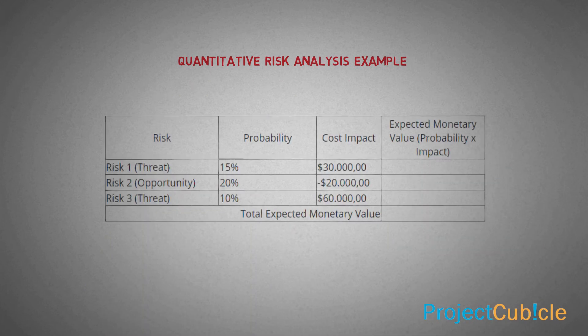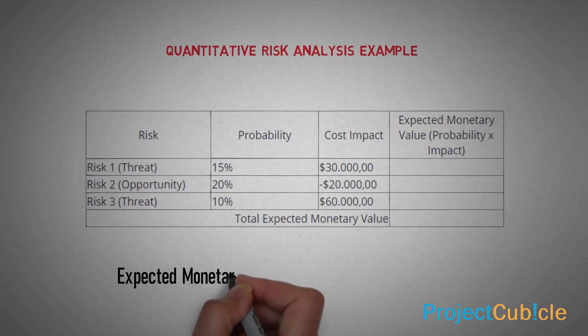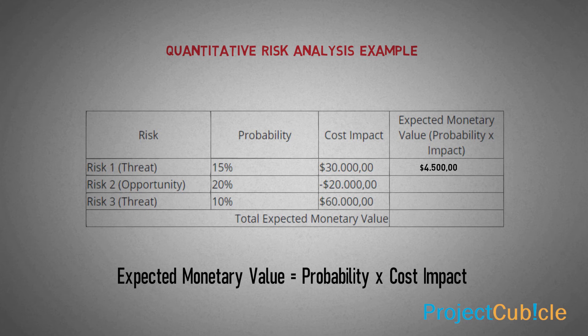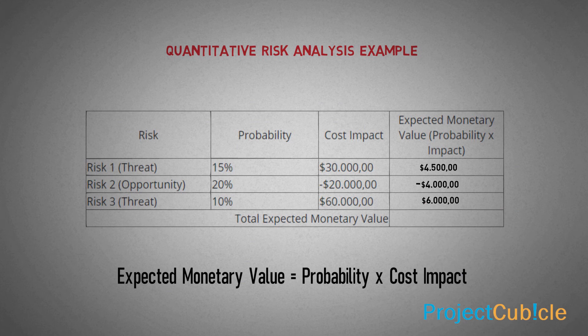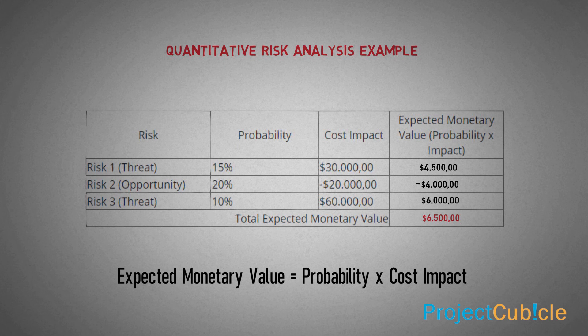In this quantitative risk analysis example, we will use the expected monetary value (EMV) technique to calculate the project risk exposure and the contingency reserve. EMV equals probability times cost impact. For Risk 1, a threat, probability times impact is $4,500. For Risk 2, an opportunity, probability times impact is -$4,000. For Risk 3, a threat, probability times impact is $6,000. The total expected monetary value is $6,500.